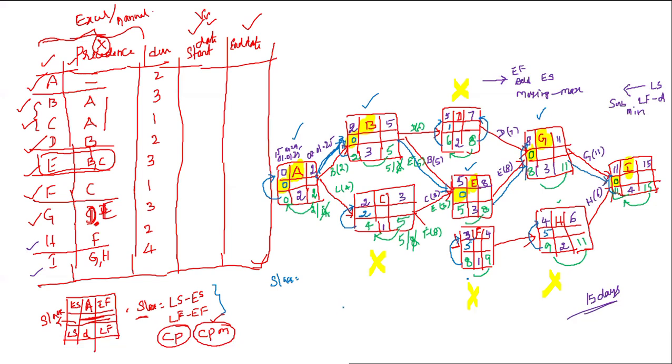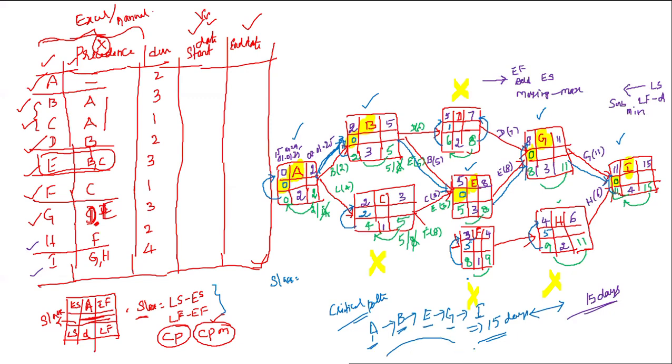Okay. Now, if you see the critical path, a very important, crucial path in our activities: A to B, B to E, E to G, to I. The duration is going to be 15 days, or hours or something. Suppose anything happens in activity A, B, G, or I. These activities will lead to delay. If you make any delay in these activities, the project will get delayed. So you have to give utmost priority to these activities.